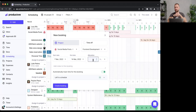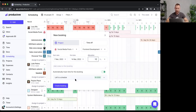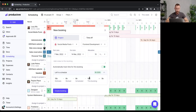If I put in 10 hours as total hours, it allocates those 10 hours across the time frame but I don't dictate when they're done each day — Lucy could do two hours one day and cram the remaining eight on the last day. There's also a 'left to schedule' option, which checks my initial estimation.